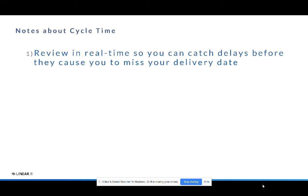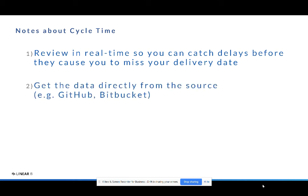There are a lot of other use cases where if you see issues inside of your iteration, you can actually fix them, so we think reviewing cycle time in real time is important. In order to do that, you need to get your data directly from the source. If you're relying on data just from JIRA or your project management system, since it's being updated manually, it may not be accurate enough for you to act on.